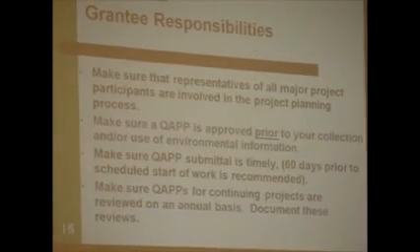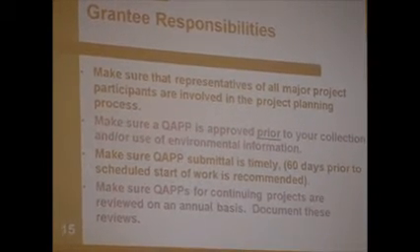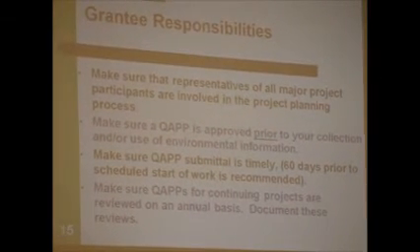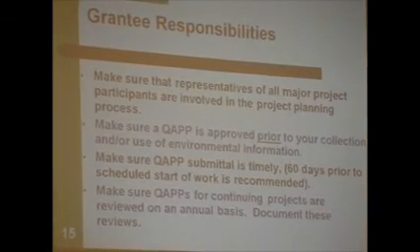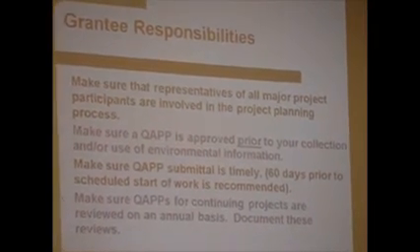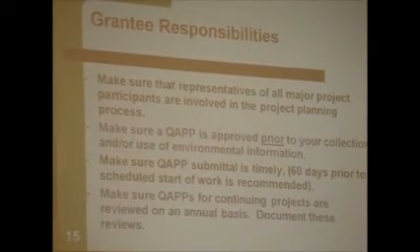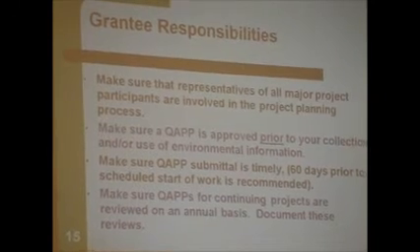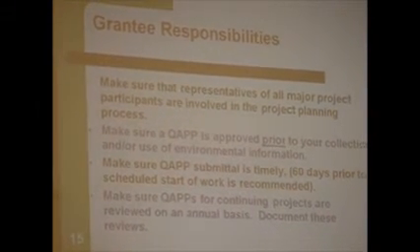Okay, next slide. Grantee responsibilities. If you are lucky enough to be the recipient of an EPA grant, these are the things you need to be concerned with. You need to make sure that everybody is involved in the project planning: the samplers, the data users, the lab, whoever else needs to be. Make sure your QAPP is approved prior to your data collection or environmental use efforts.